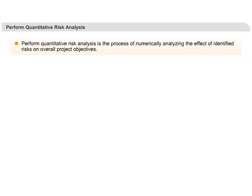Perform Quantitative Risk Analysis. Quantitative risk analysis is the process of quantitatively analysing the risk data. Remember, this should only be done if it's worth spending the time and effort analysing the risk, else it's better to move from qualitative risk analysis to risk response planning, which is the next step in risk management. Usually, quantitative risk analysis is done for the highest risks on the project to further investigate them.